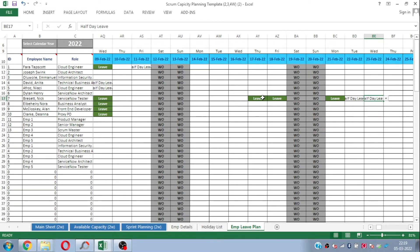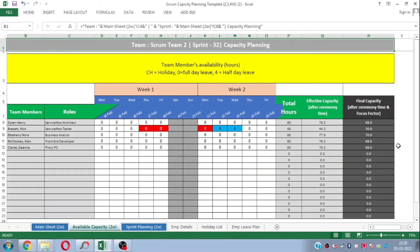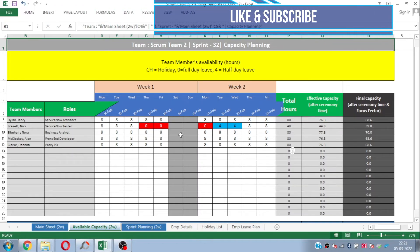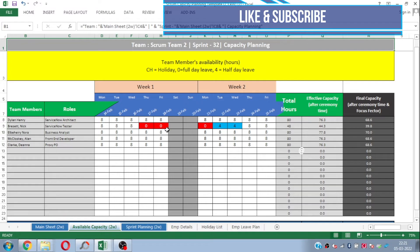So we have taken an example that Nick is on three full-day leaves and two half-day leaves in this particular sprint. Now let's see if this is automatically calculated in the available capacity sheet. In this sheet you can see the scrum team and sprint number at the top, and the team members are the same as selected from the first sheet. You can see the available hours for each member for this particular sprint. Since Nick is on full-day leave on those three days, there is no available capacity shown for those days. Since he is on half-day leave on the two other days, his half capacity is shown for those particular days.